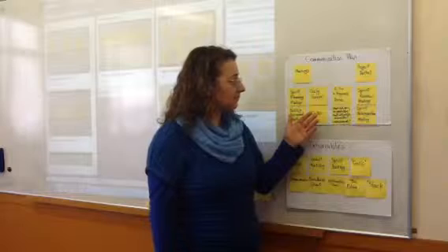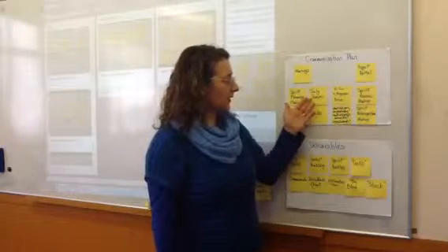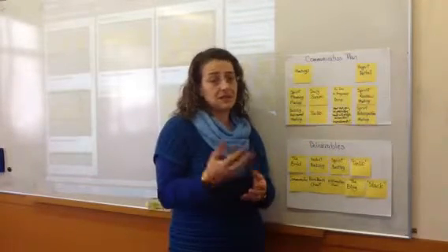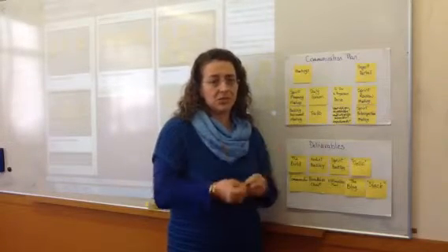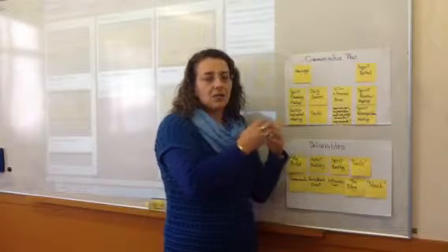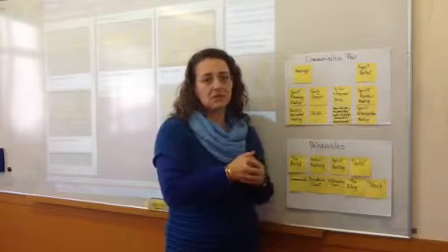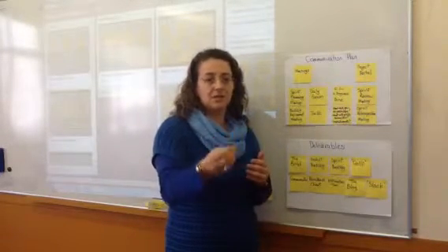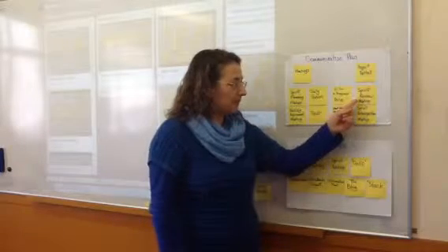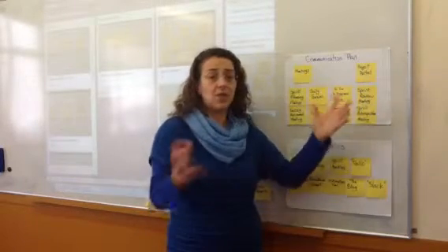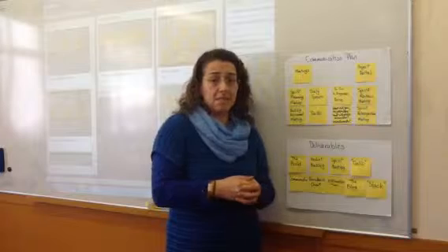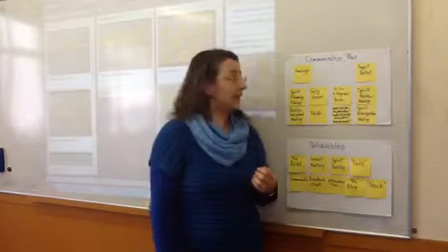Just to carry on with the meetings, at the end of the sprint, when we have a product that we can demonstrate, and it is a demonstration, it has to be a usable, shippable product. So whether it's creating a facet on the island or the website or interacting with the social media, that will be ready to present to the customer and students. The clients then can use it. So for that we need a sprint review meeting where all parties, the development team, stakeholders, and anyone else, the students, student reps, can come and have a look at the demonstration of that product.